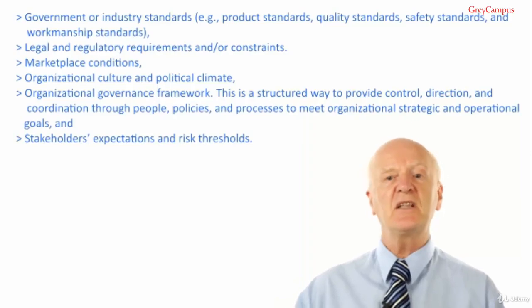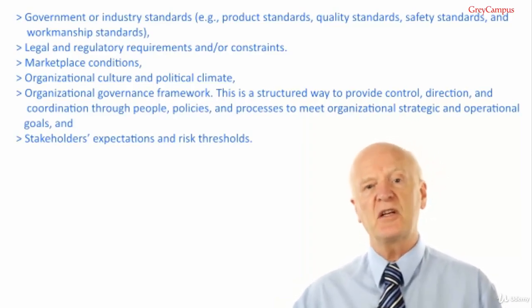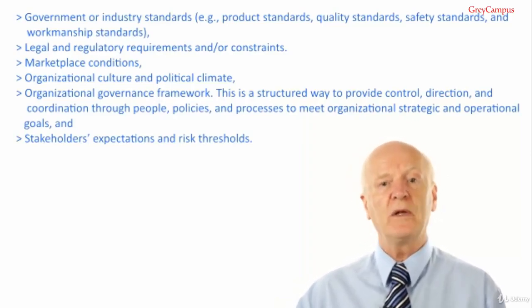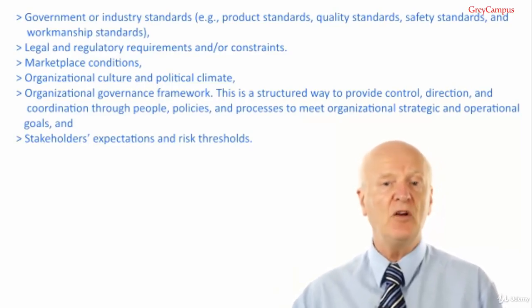A risk threshold is a level of risk an organization or key stakeholder is willing to bear. It's also known as a risk appetite. This is important because a huge multinational organization may be happy to risk losing several $1 million on a major project, yet a small family business may refuse to risk losing a few $1,000s.